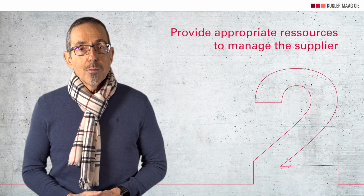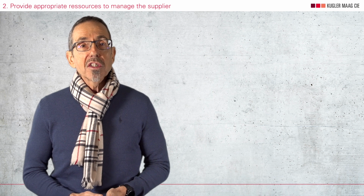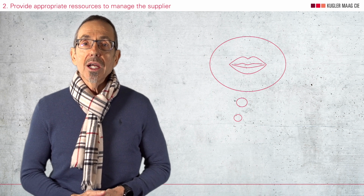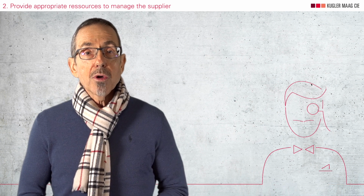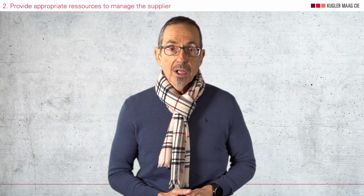Point number two is provide appropriate resources to manage the supplier. It is a common mistake to severely underestimate the capabilities required to manage a supplier. You can't imagine how often I see organizations thinking that this is a piece of cake, or that talking to the supplier from time to time would be enough. No, you need an experienced person who will invest a reasonable amount of time to manage the supplier. For large corporations, this can be a full-time person who deals with the supplier on a daily basis.